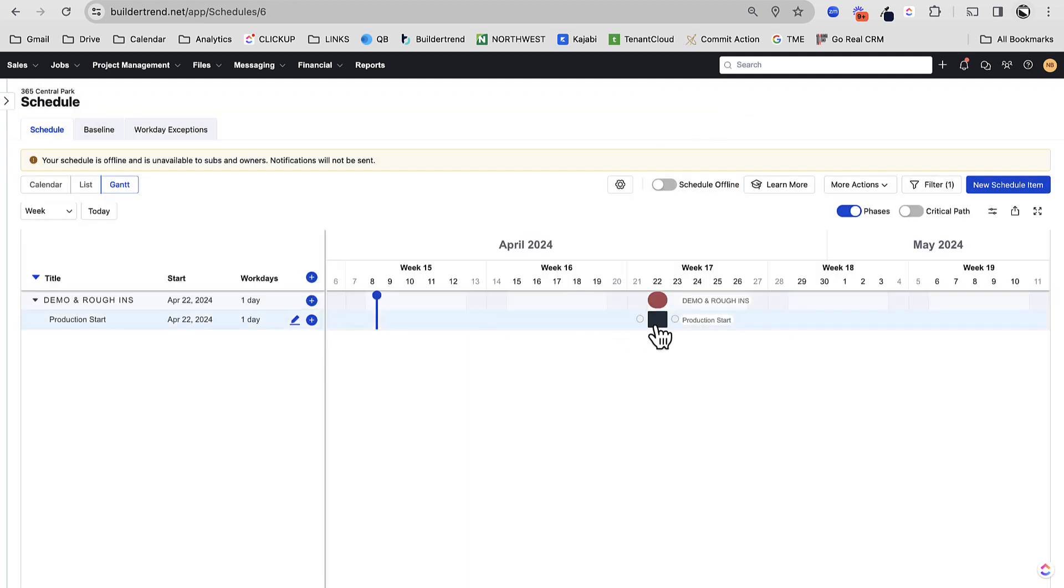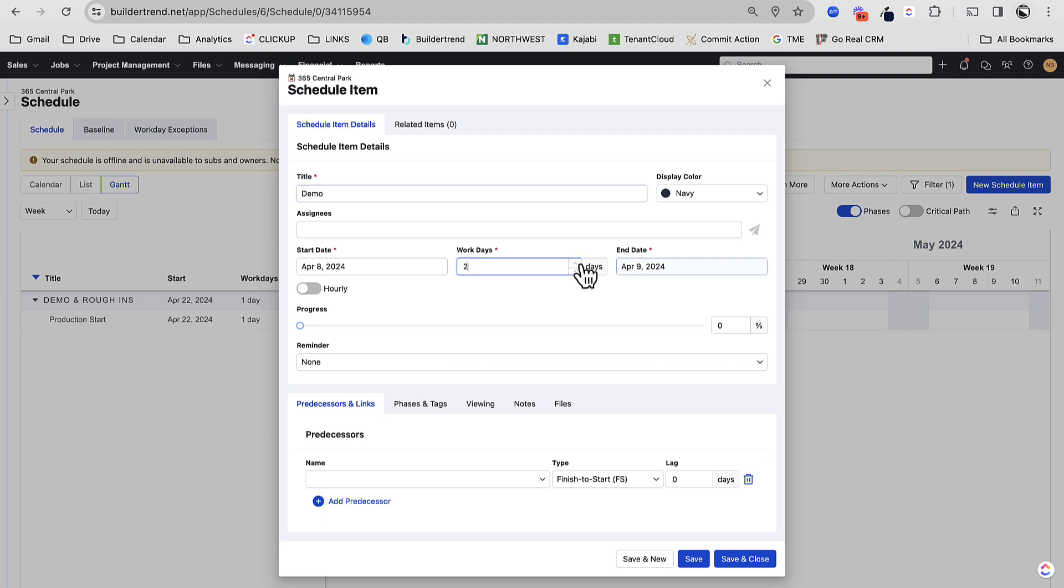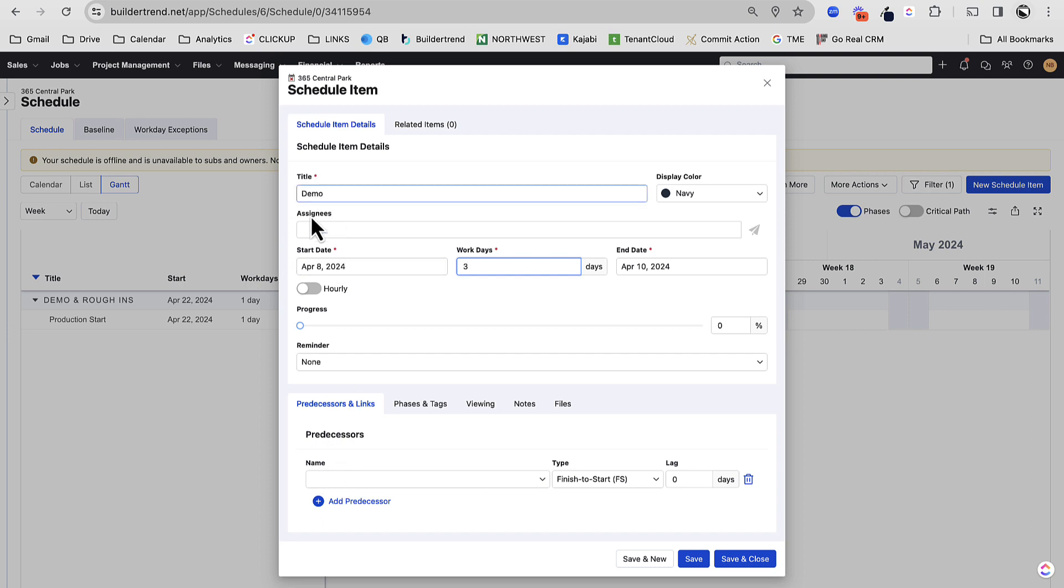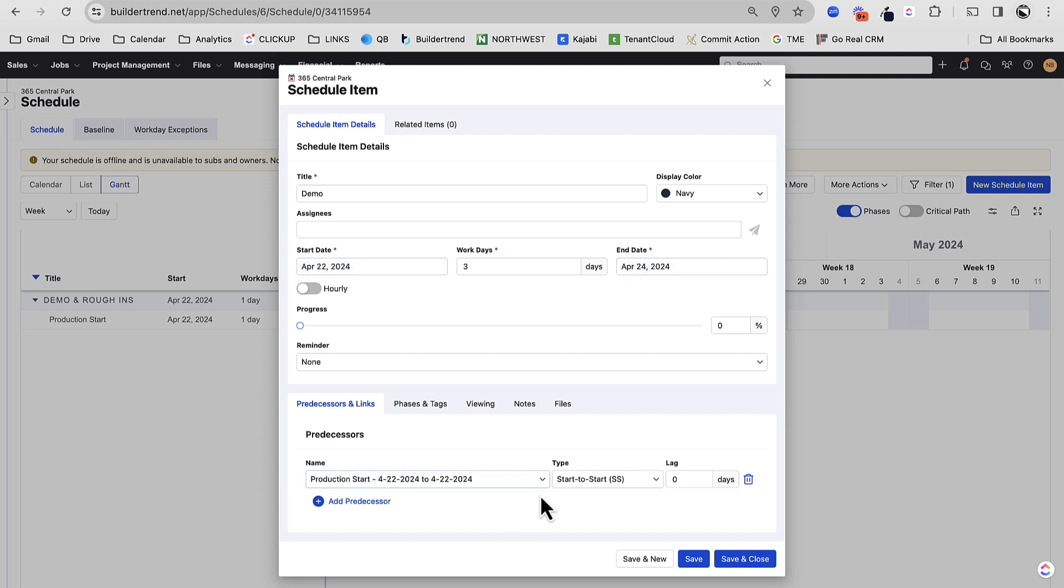All right, so there you see one single line. Now, the reason I like to have a production start is for this exact reason. The first thing that we usually do on a project, at least when we are on-site, is we do demo. So that should be some kind of task. Now, demo might take three days or so. I don't really know when I'm going to start it, but here's what we can do. And we're going to start to build in predecessors and dependencies. I'm going to say that demo is dependent on my production start with a lag of zero days, meaning the day that my production start happens, and this is actually a start to start. The day that my production start happens, I'm going to start my demo. Let me just save and close this.